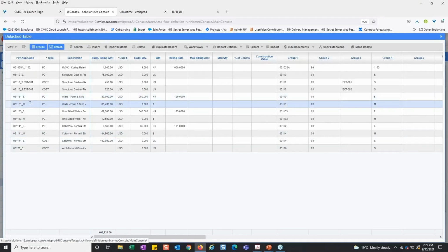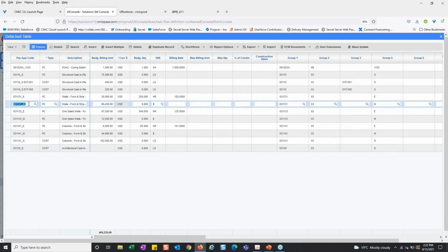Okay, excellent. What I wanted us to see here is this bill code, right? And what did I say? It's the lowest level cost code, lowest level category. That's what I'm seeing in this first part of the string. There's my cost code, and then the second piece is the category. Now this underscore, versus a period perhaps, and how this bill code actually looks, what that separator is, is controlled in that mapping rule. So you're able to decide how much of the cost code you want to appear in the bill code, what the separator between the category is, and the same when we get into the PCI side: how do I want to show the bill code that represents that PCI for me, okay?